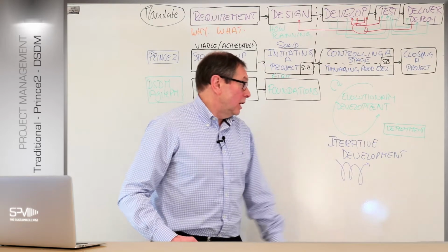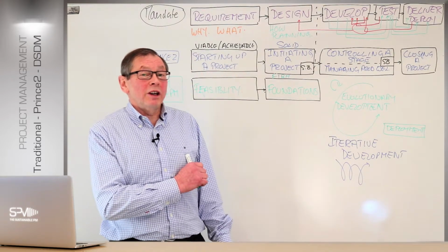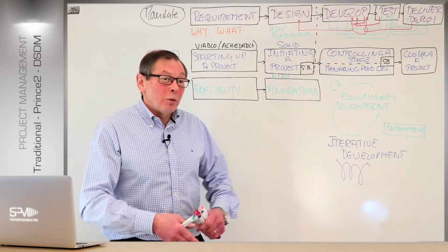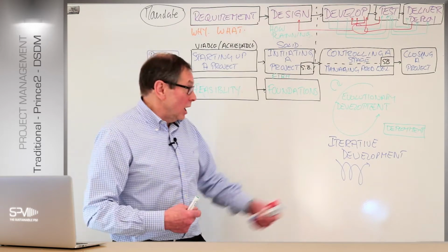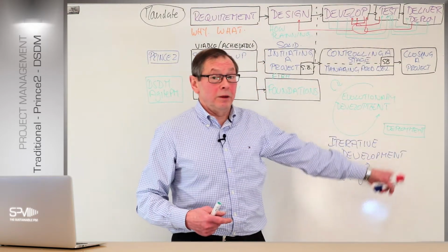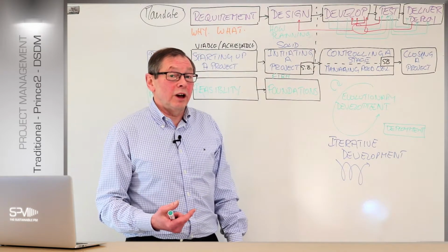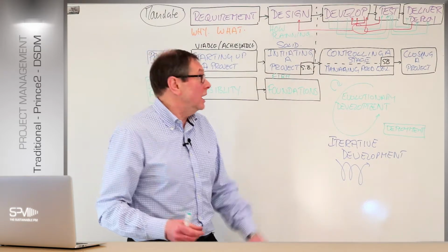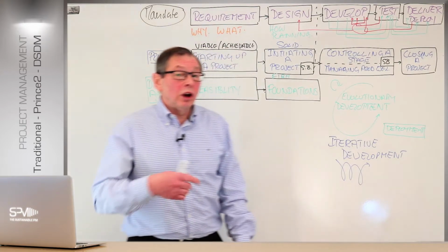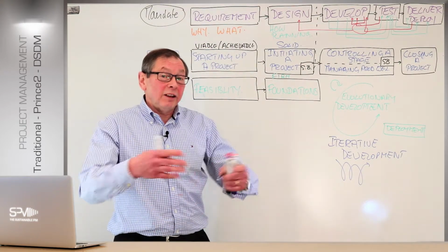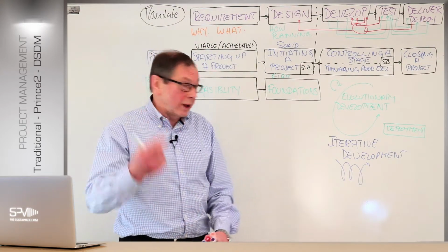But we deployed it. But don't always be in a hurry to hand it out to operations. The danger of doing that is, once they've got ownership, taking it back. Because this is still within the project time frame. You're still deploying during the project time frame, which gives you the opportunity that if there are problems here, you can go back and fix it, understanding the impact on the overall deliverable, but we'll look at that later.